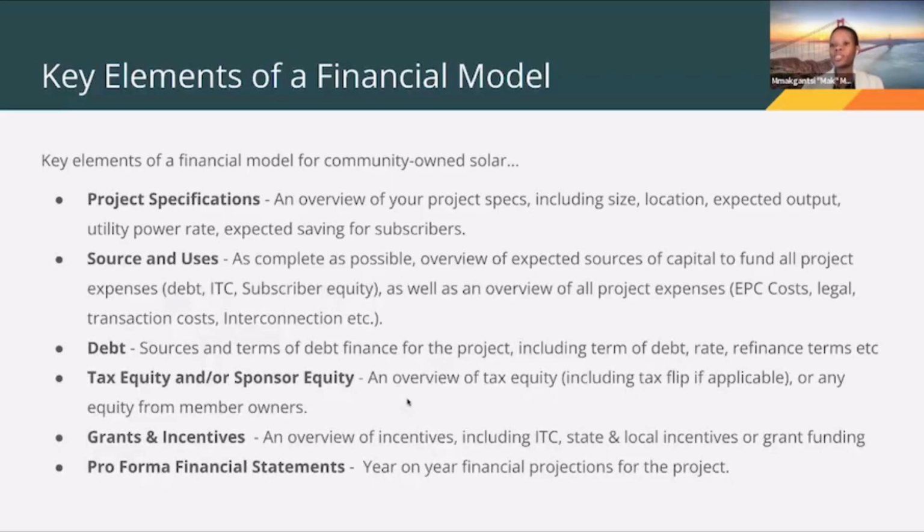And then the model will go into detail on each of these. So things like debt, this will outline your sources and the terms of your debt, how long it'll take to repay it, what is the interest rate, whether it's refinanceable and when you're likely to refinance it. And similarly, if you are using tax equity as a part of the project, this will be reflected in the financial model as well.